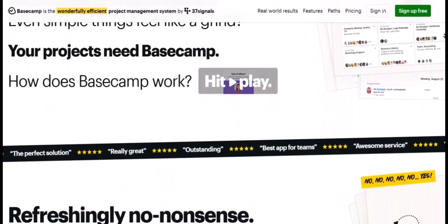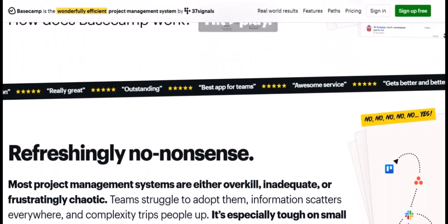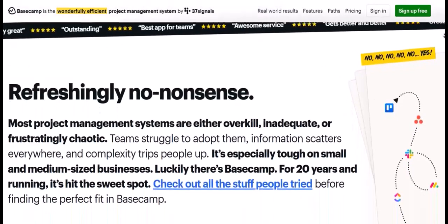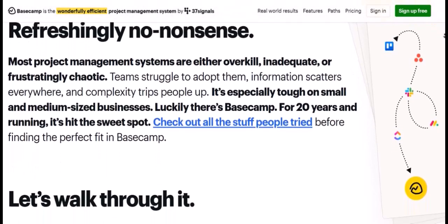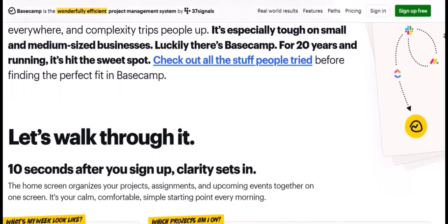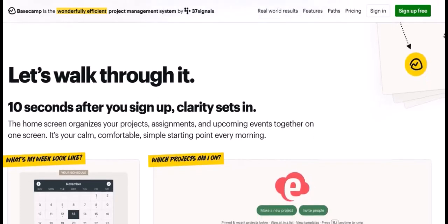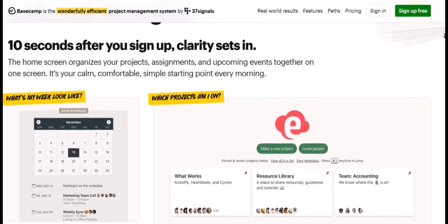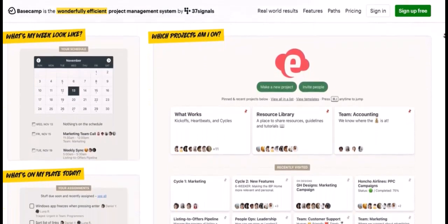The impact of clear assignments. From a project management standpoint, the simplicity of Basecamp's assignment feature is its strength. It encourages several best practices. Singular accountability. By only allowing one assignee, Basecamp enforces clear ownership. This reduces ambiguity and encourages the assigned individual to take full responsibility. If a task requires input from multiple people, the assignee becomes the orchestrator, responsible for gathering that input.